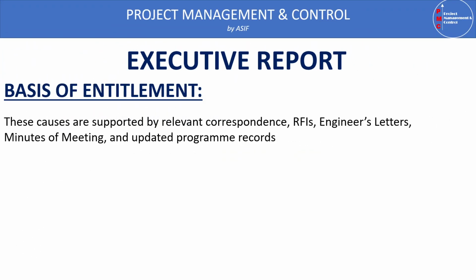Then the causes on the basis of the delay event should be supported by relevant correspondence, and we have to provide relevant RFIs, engineer's letters, correspondence, minutes of meetings, weekly and monthly reports, and updated programs as contemporary records in support of the claim.